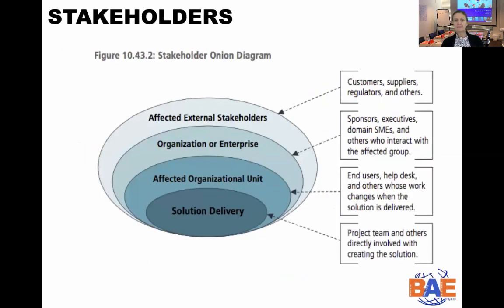Another technique — or rather diagram — is the onion diagram, the stakeholder onion diagram. This is really useful when you have to think about who are all the stakeholders that need to be considered for your particular initiative. You start by looking at the solution delivery, the affected organizational unit, the organization or enterprise, and also the external stakeholders that might have an influence or some power over what you're doing.